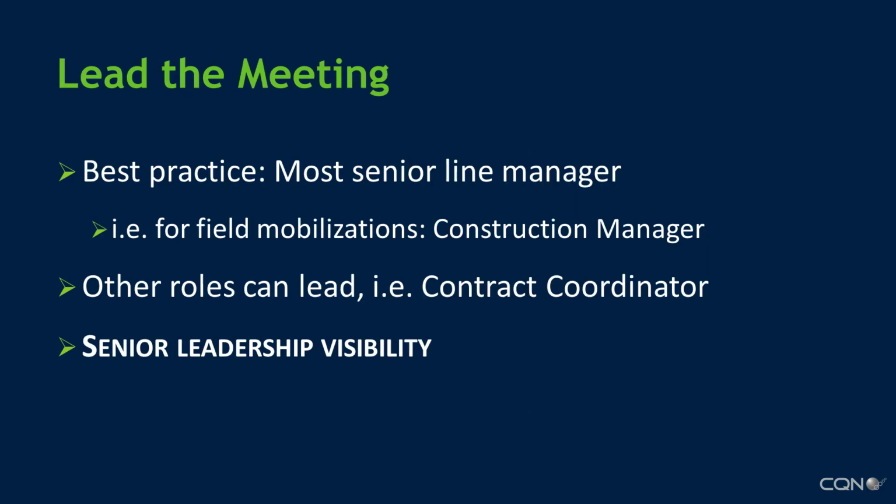Who should lead the meeting? The best practice is for the project manager or most senior line manager to lead the meeting. On field mobilizations, this is frequently the construction manager or a similar role. Other roles can effectively lead the session, but visibility and leadership by the highest level line manager brings legitimacy to the process and subject matter.